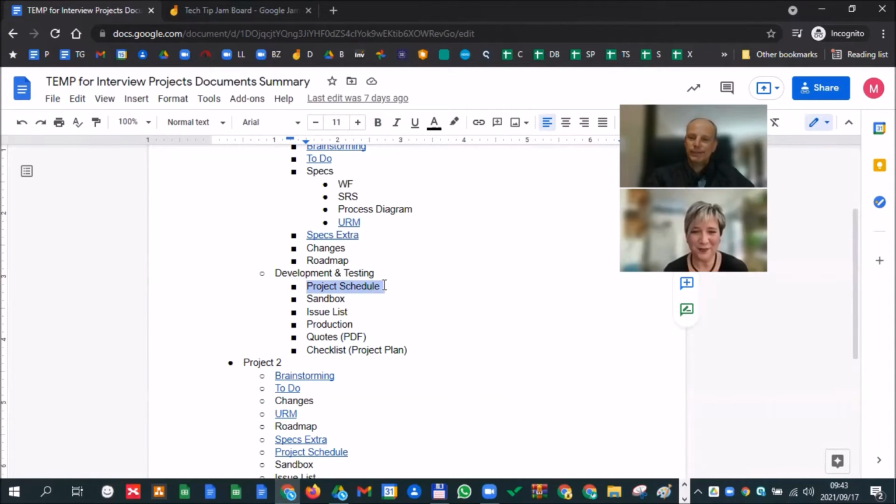And it's tedious because you need to do every single step, who's going to do it, and you need to be realistic. Is the specific developer going to be available from this date, taking into account his other responsibilities? The challenging part is that it's not just working on one project at a specific time. So this is more of an art than people realize, to have realistic project plans, and everything's in flux.